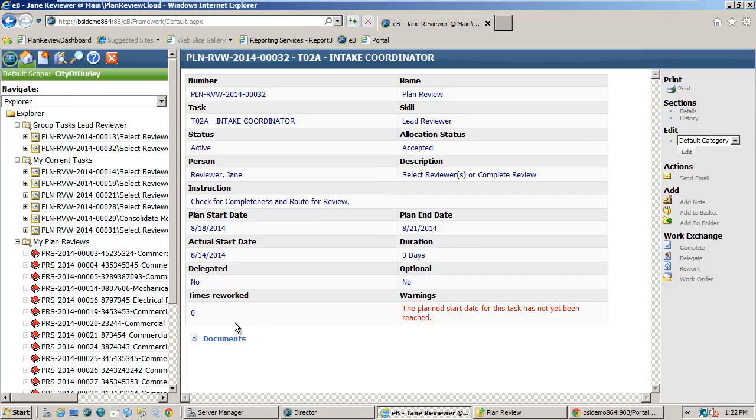The process for each task is as follows: receive notification, log in and view the task, accept the task, do the work, and then complete the task.